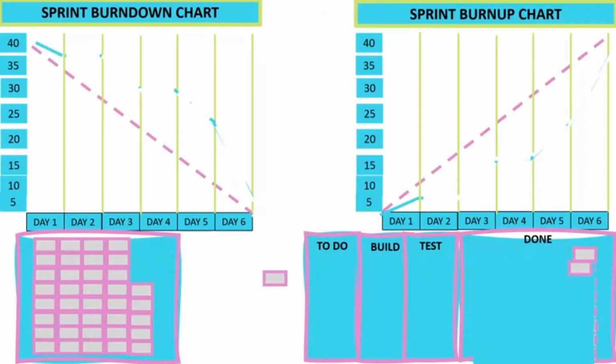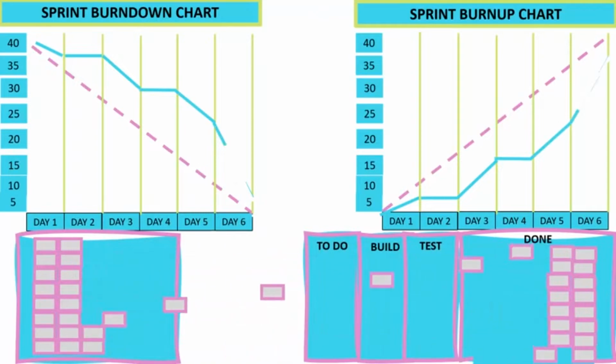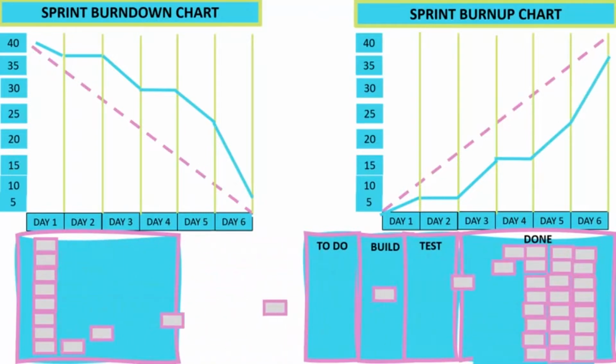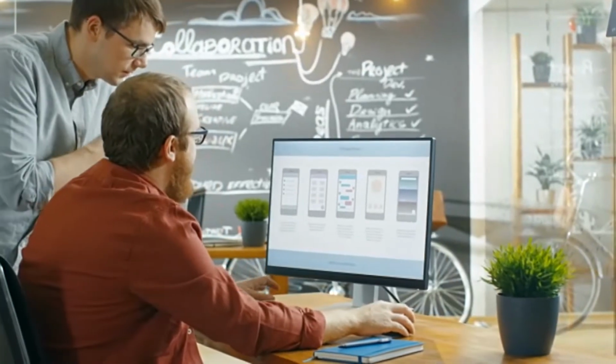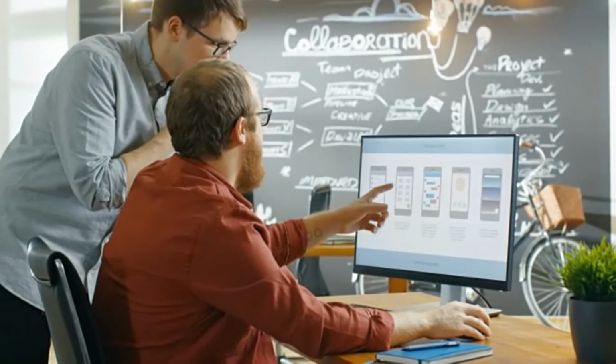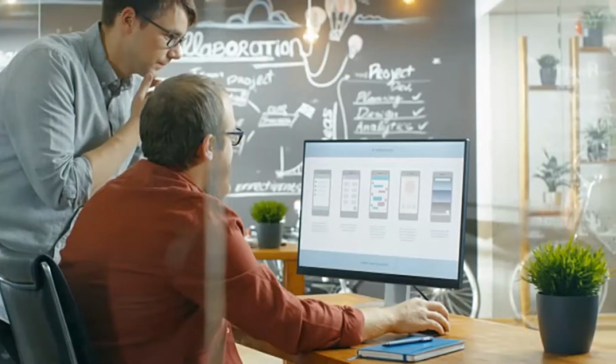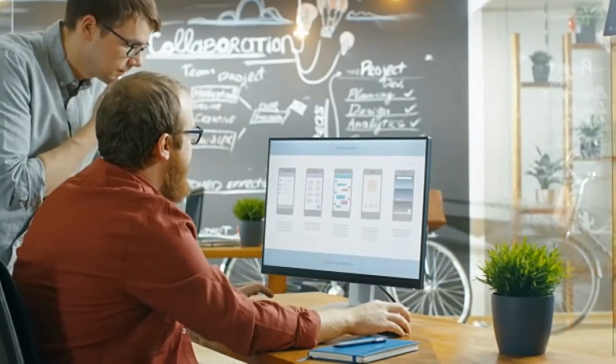Each team has its own capacity. When a team uses story points, be aware that the number of story points a team can complete in a given time is unique to that team. When teams provide their own units of measure, teams are better able to assess and estimate and deliver their work. The downside of relative estimation is that there is no way to compare teams or add velocity across teams. For example, if the first team accomplishes 100 story points per sprint while the second team accomplishes 50 story points per sprint, that does not mean the first team has more velocity.